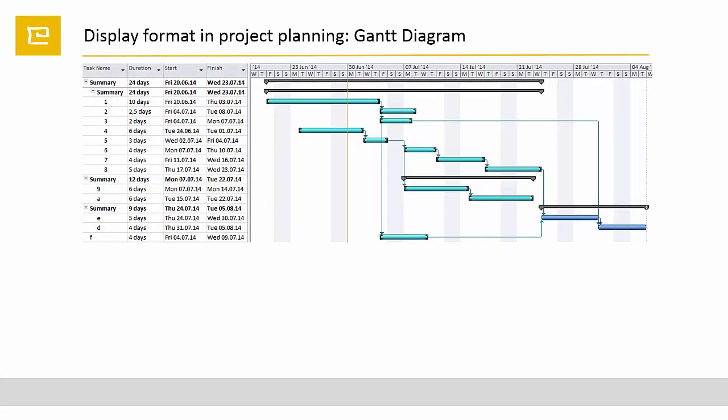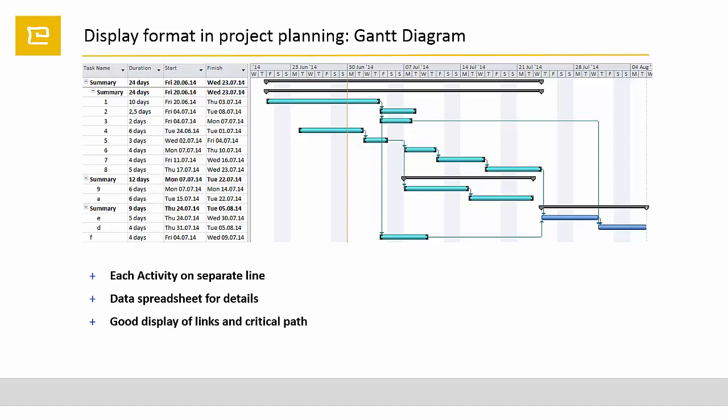Very common is the Gantt diagram. The Gantt diagram adds the horizontal time axis and displays each activity in a spreadsheet line. It has also a good presentation of dependencies and uses the critical path method. With its direct relation to the time axis, the Gantt diagram is the most popular display in project planning.